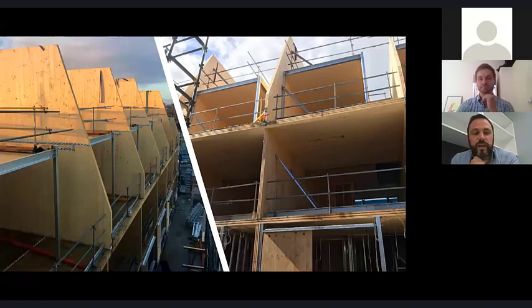So this is another project. This is the Brunswick job where there was a fair bit of steel incorporated, and the message here, albeit not a hotel but an apartment, I can see a lot of requirements for steel in these types of structures, especially if we're not going with that possible honeycomb structure. But the example here is that the steel wasn't modelled. It was modelled in conjunction with the CLT, but we had two people modelling it from a supply perspective, and it created issues on site.